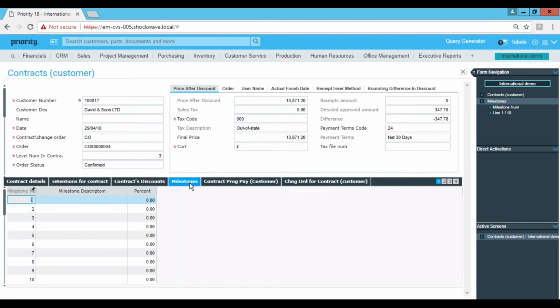That's what a milestone is. So instead of calculating yourself and applying for 10% or 50%, and instead of using a combination of percentages, you set up a milestone and say, at this time we will finish 25%. So that's what we're applying for. This is fixed. But you cannot use a combination of both methods. You have to use one, either milestone or performances.